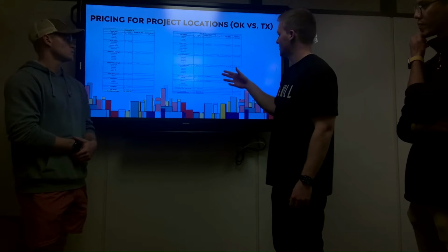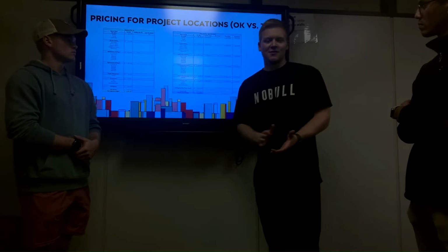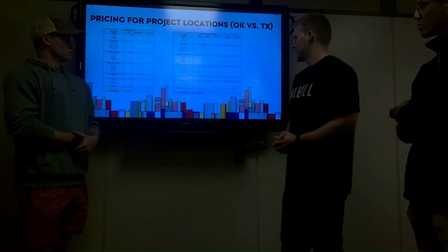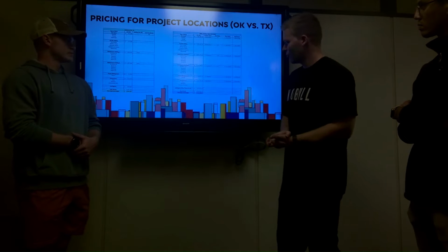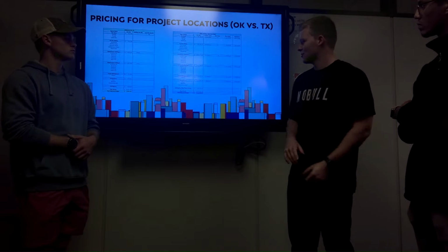So we used all three factors for all of them except for project management and procurement. We didn't worry about size. We didn't think size was a big factor in that. But anyways, we got Dallas to be 4.7 million, so quite a bit larger than Oklahoma City.